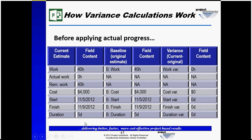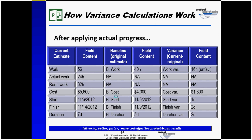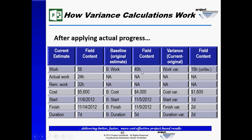As we begin to update our current estimate fields, we will see variances be generated automatically. In this case, this task was updated with actual work of 24 hours and remaining work of 32 hours. When we add 24 and 32 together, which Microsoft Project will do, we get a new estimated work of 56. The baseline is 40, so the variance, which is now unfavorable, is 16 hours, because it's 16 hours higher than the original baseline work estimate.